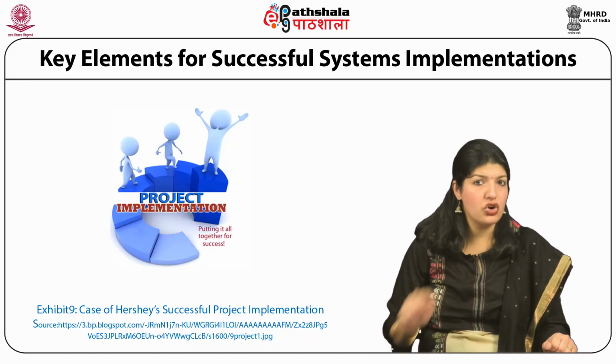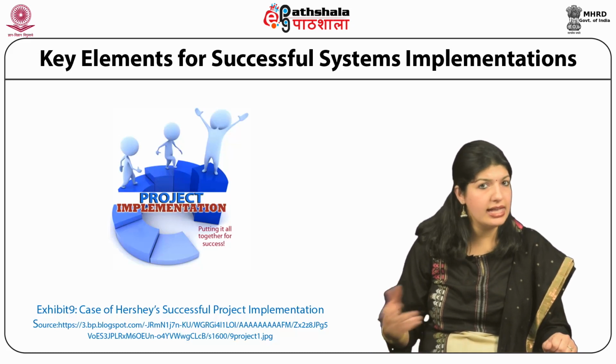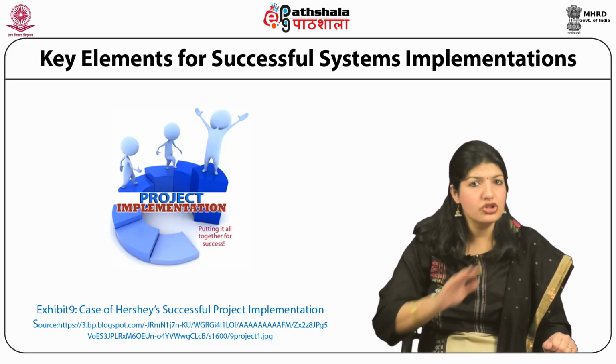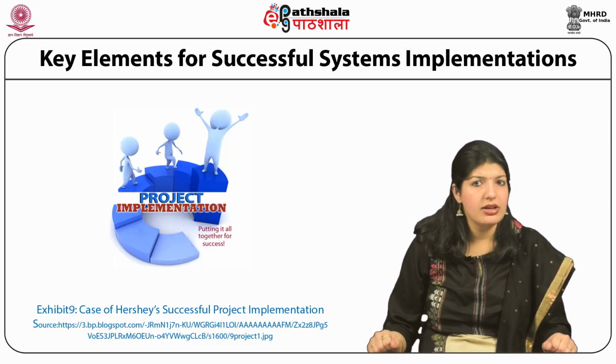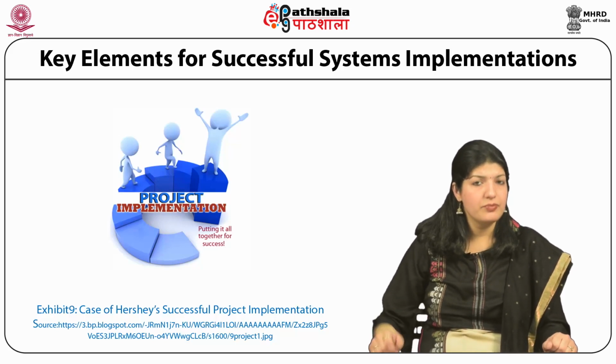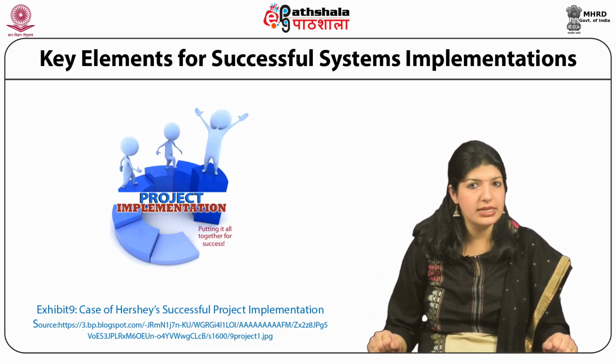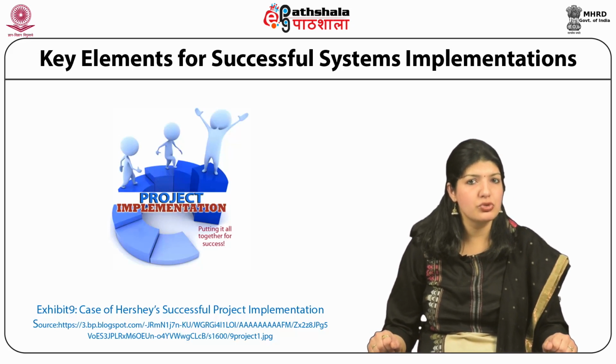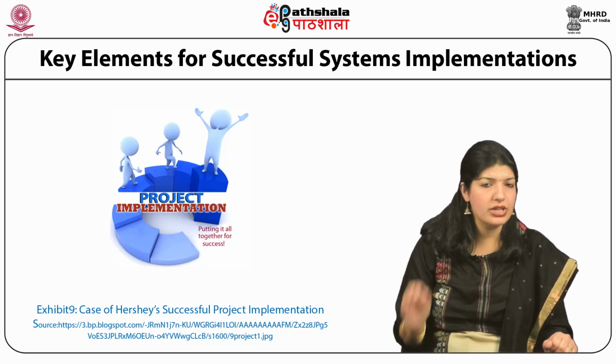Testing is to make sure that the system is functioning as it is designed and must be thoroughly tested. A test plan should be detailed as soon as the designs are completed, and testing resources should be focused on the main functionality of the system.